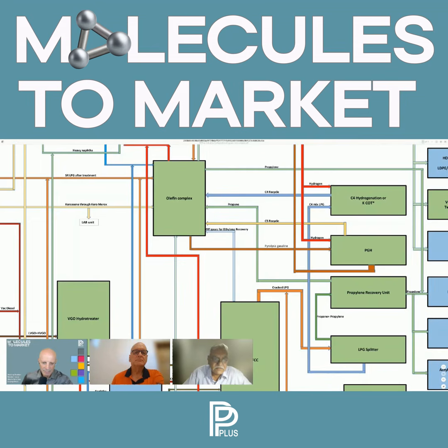Now, the other important part is, as I mentioned, we don't do FEED work in India. We do plus minus cost estimate. So if my PNIDs are of a good quality, and if I can get some advance information on this from the licensor at an early stage, I can make some MTOs also to assess the quantum of work and improve the quality of our estimate.